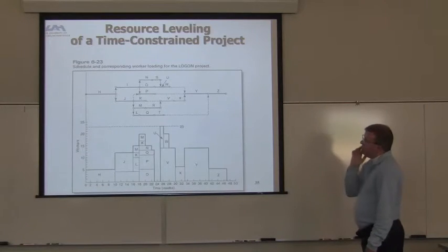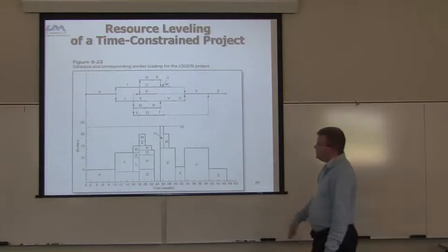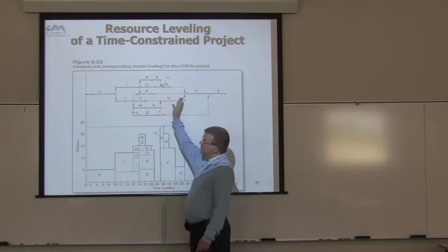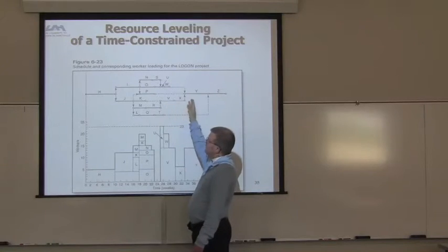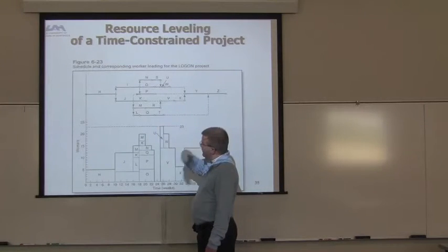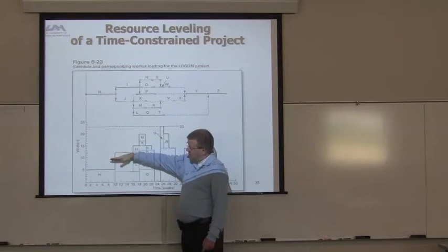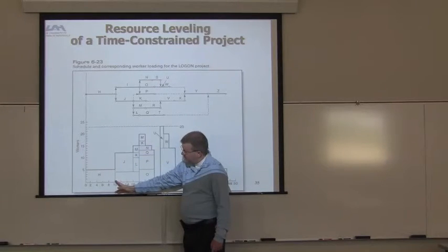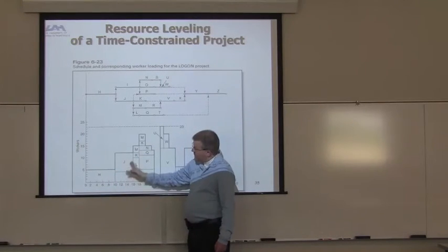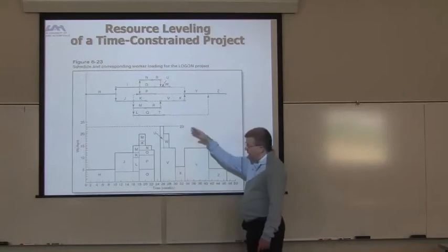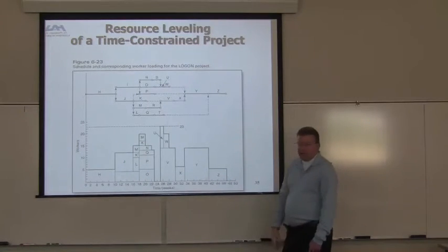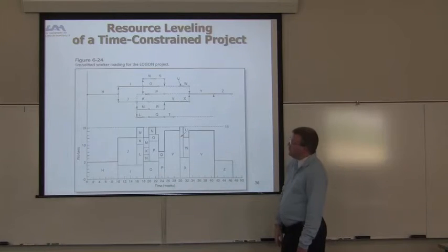And so you can look at trying to figure out how to, if you just did it graphically, right, and you looked at all the projects you had or all the tasks you had to do and the resources required for it, you can see how crazy it goes. You know, for the first 10 increments, you need 5 workers. For the next few, you need this, and so you've got these hills and valleys, which are crazy when you look at it. So what you can do is spread it out, right? Smooth the worker loading, and you can figure it out a lot easier.